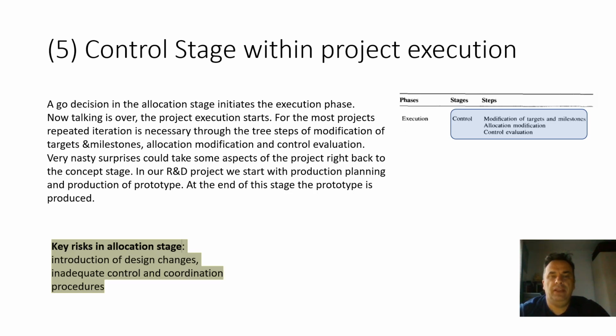But finally, we find it and agree on it, and at the end of the stage, the prototype is produced. Introduction of design changes in this phase are very risky, should be avoided. Sometimes it's better to go back to the concept phase or the design stage.